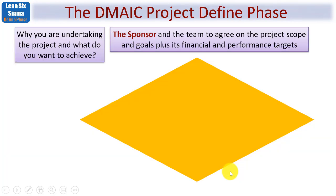Here in the DMAIC project Define Phase, what the Define Phase is all about is to understand why the organization is undertaking this project and what exactly you want to achieve. A key player is called the sponsor, and it's the sponsor and the team who will want to agree on the project scope and goals, plus its financial and performance targets. Scope means what's included and what isn't — what's in and what's out.